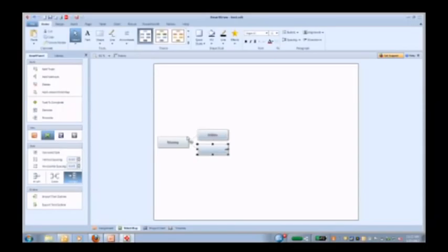If I go Control arrow down, you see I've duplicated the same shape as what I have above and coming off the same node. So I'm going to call the first one Utilities. I'll call this one Tech. And I'll call this last one Physical Move. And off of each of these, I can create subtopics. I could drag a shape over there to do that, or I can simply use my arrow keys. Physical Move, let's say that takes movers. And it also takes offsite storage that we need to deal with.